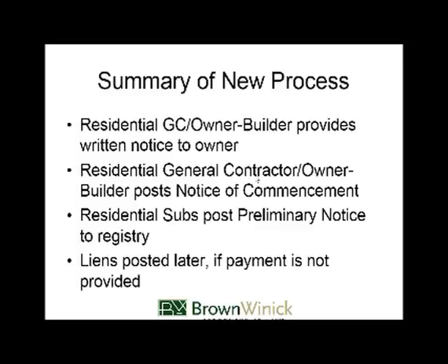There was a question here that says, do I agree that notices are not required by statute when the general on a residential project doesn't use subcontractors? That is a correct statement. The statute says a general contractor or owner-builder who intends to use subcontractors needs to follow these rules.